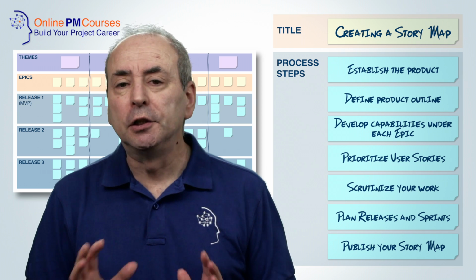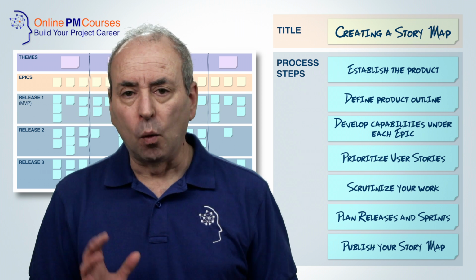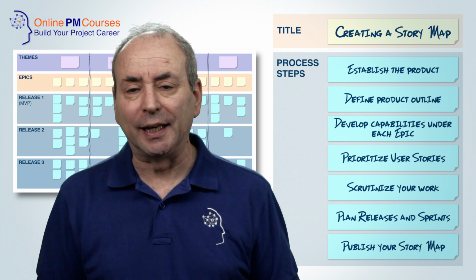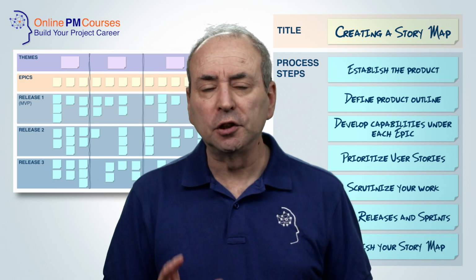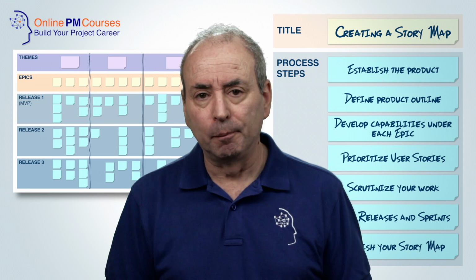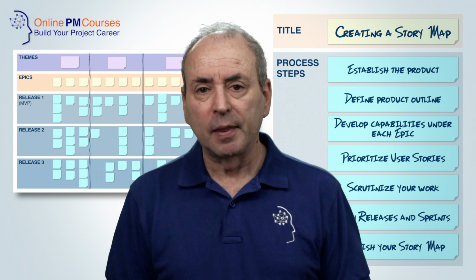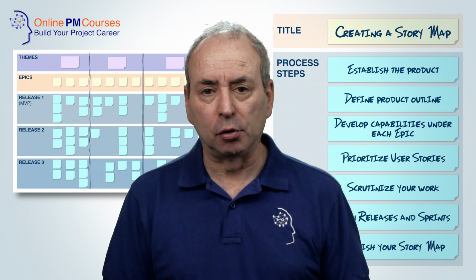But remember, user story mapping, like every agile process, is iterative. Once you've created it, the team needs to maintain it and develop it to accommodate changing information and new understanding of the work you're doing. Your user story map needs to be a living document that you can use to track progress, that you can modify and add to and take away from. It's a tool that you can use to help you groom your product backlog and to determine the drawdowns that you'll make to create each iteration or sprint backlog as you move through the product development process.